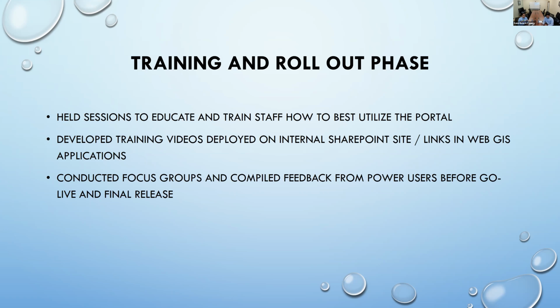And I think this is one of the last divisions that we're going to talk about, regulatory compliance. They're responsible for our health and safety plans. This is another division where they're drawing in these health and safety plan boundaries, which are mandated by the Florida Department of Environmental Protection, to help delineate where contaminated soils exist. So if you're doing any underground utility work in that area, there's supposed to be a health and safety plan.